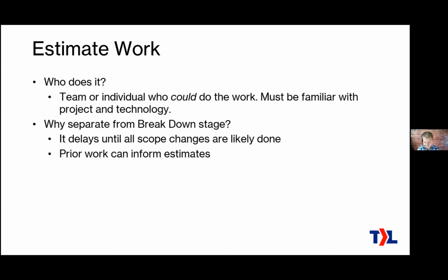If the project gets canceled, or a part of the project gets canceled, and you delayed the work on it, then you haven't wasted it, because you do it at the last moment before you need it. That means you're less likely to waste work if plans change. And like I said, you can learn from the work that's actually being done if you wait to the last moment to do it.